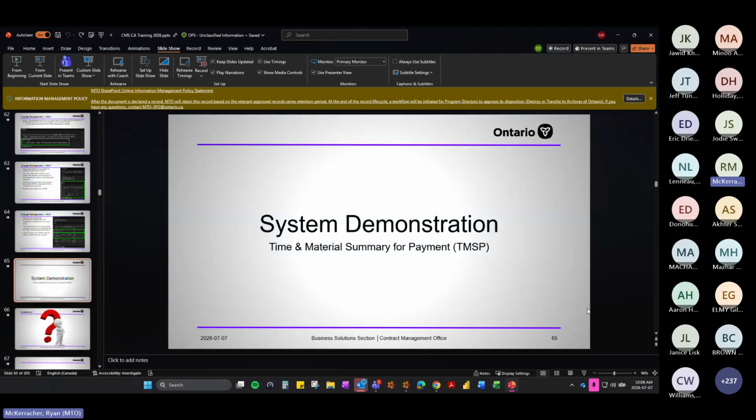Can CMS make the contractor submit an IR before a CR can be submitted? The CMS can't make the contractor do anything. But it's not a requirement to submit an information request before a compensation request can be submitted. They're two different things, and they rely on the CA to recognize veiled compensation, either overt or not. So we really rely on the CAs to distinguish the difference between the need for an information request or a compensation request.